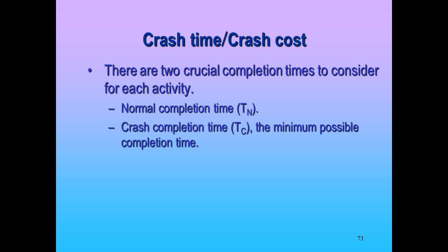Sure. Because crashing this activity, great, it's $100 a day, but who cares? It's not a critical path activity. Maybe I get it done faster, but does it affect my project completion date at all? No. This one, however, the critical path activity, remember when I delayed a critical path activity, what happened? It added it to the end. Well, just think, if I decrease it, it's also likely to decrease the overall project completion time.